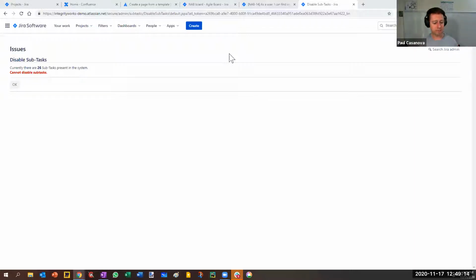Another time that you might use tasks in Jira is if you have things like writing documentation, getting legal approval, or managing dependencies inside and outside of the team as well. My team at the moment are using tasks for managing those sort of dependencies. It could be actually having a task for the elaboration of a story or for splitting out stories from an epic. So rather than bouncing a story from one sprint to another, the story itself remains in the backlog, but the work required to prepare that story for delivery is articulated through a task, and that could be a good fit. Does that kind of answer your question?